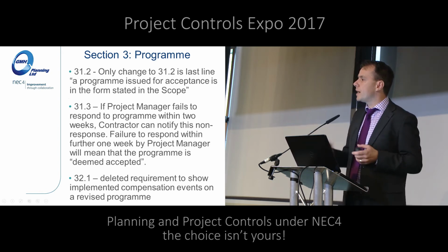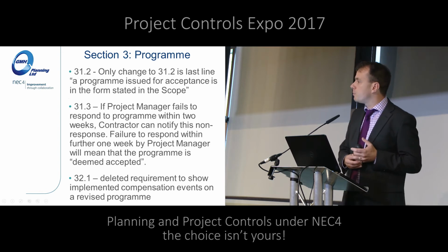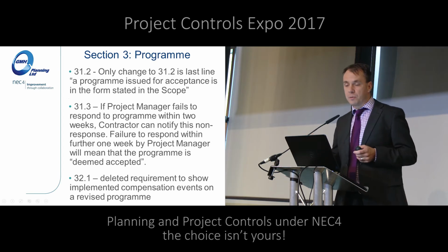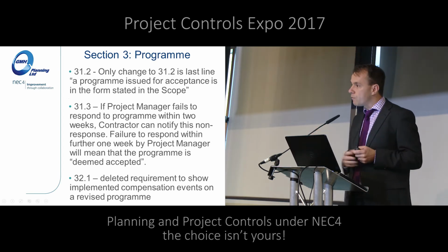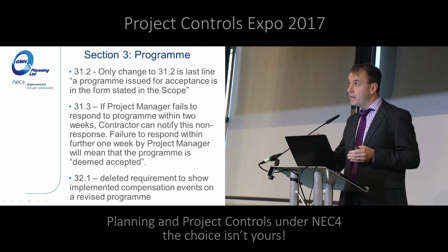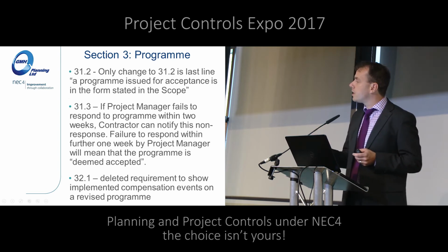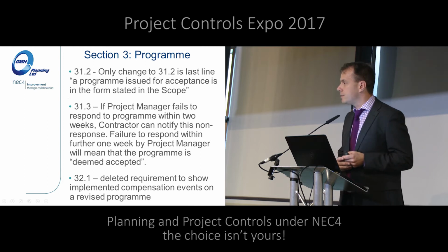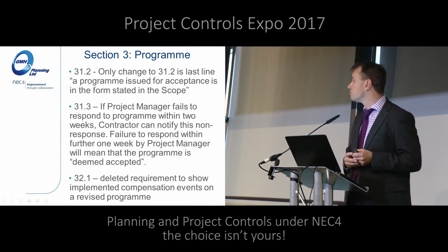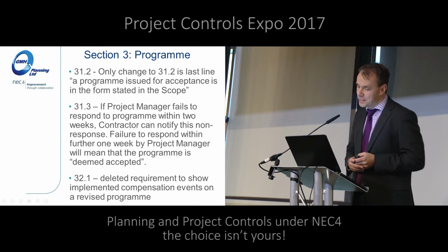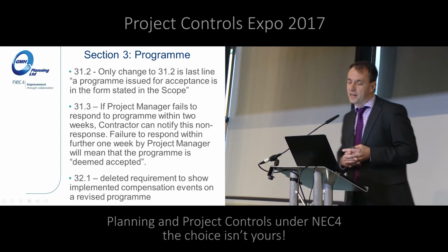Raise your hand to the room, contractors, if you've ever had a project manager not respond to your programmes. Ever had that happen? Okay. Now, if they don't respond, you can remind them of their failure to respond within the correct timescale, and after a further week of silence, that will now be deemed accepted. Good clause? Okay. No, from the client. I think that is a good clause.